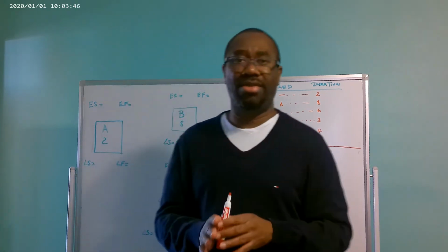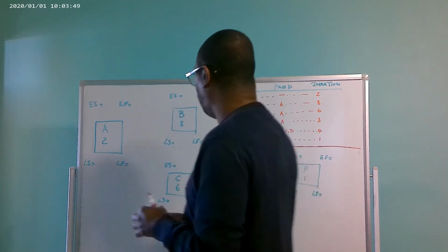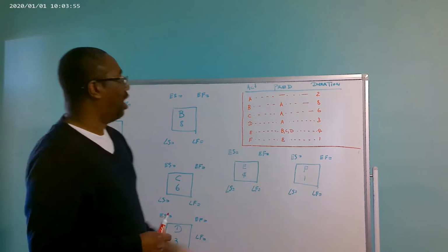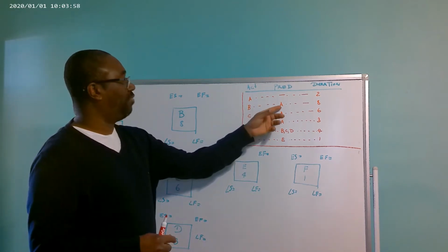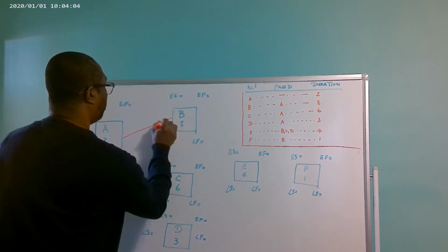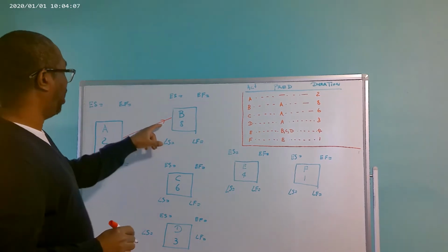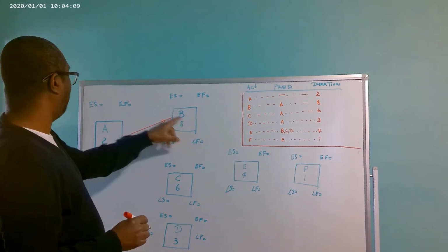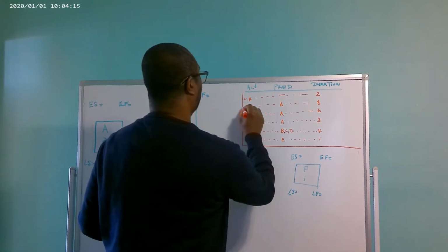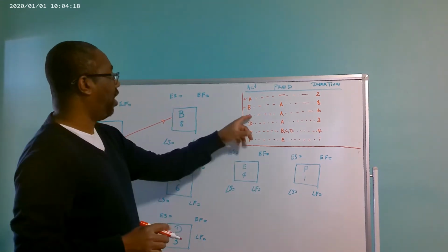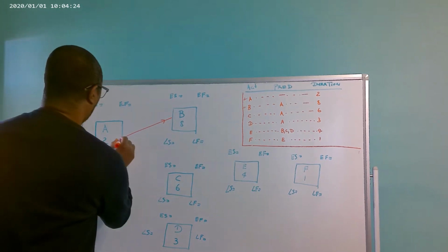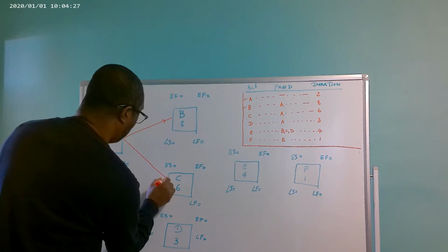So I'm going to plot the diagram, so just pay attention now. Activity A comes out of nothing. Activity B comes out of activity A, so we merge activity A to B like this, and note the arrow. This arrow indicates that activity B comes out of activity A. Activity C comes out of activity A also, so we have activity C here and merge it there.